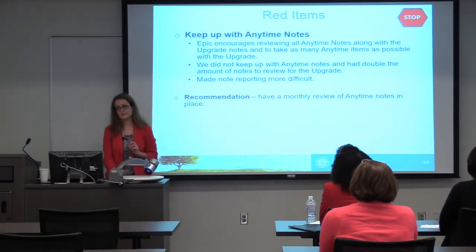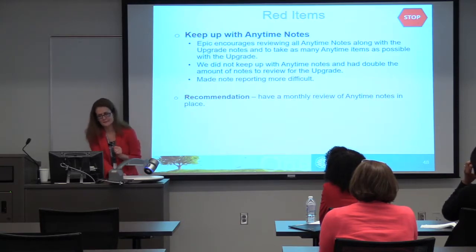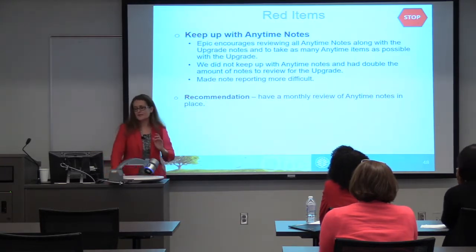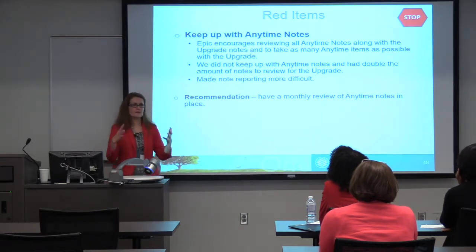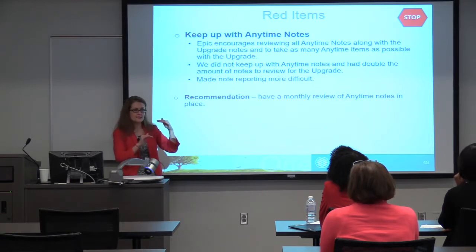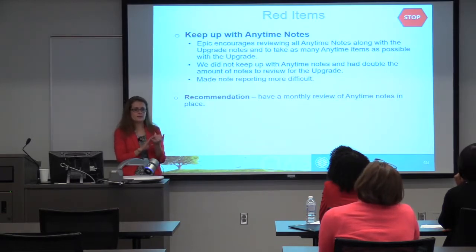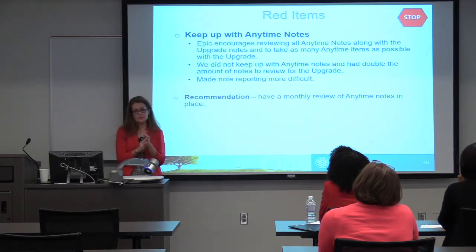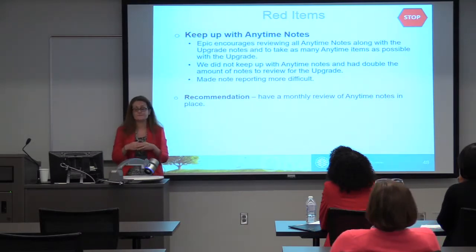All right, so let's get our, don't do this, out of the way. With the upgrade, Epic supplies what they call Nova Notes, and it's basically, here are the notes that you need to read to determine what this piece of functionality will give you, what build you need to do, what training you need to do, and what testing you need to do. So there are a lot of notes for the upgrade.